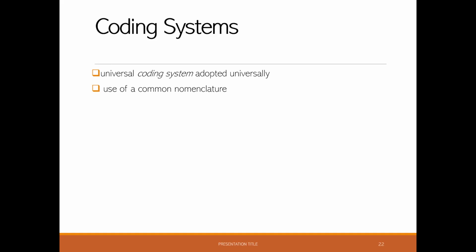The use of common nomenclature is basically motivated by the desire for better integration of organizational efforts and improved information flow. In particular, coding systems are adopted to provide a numbering system to replace a descriptive system of the item. These codes reduce the length or complexity of the information to be recorded. A common coding system within an organization also aids consistency in definition and categories between projects and among the various parties involved in a project.